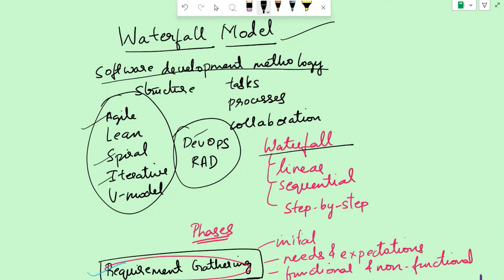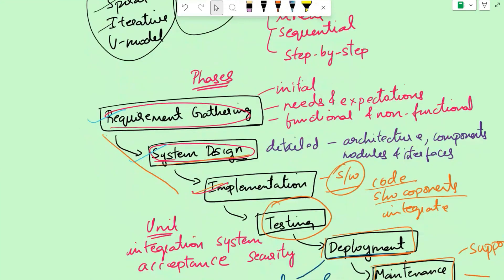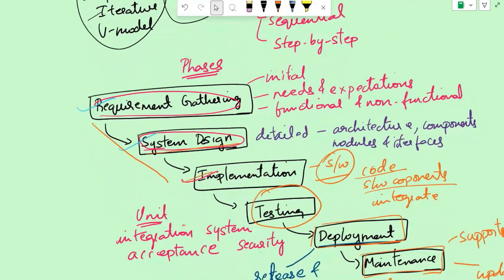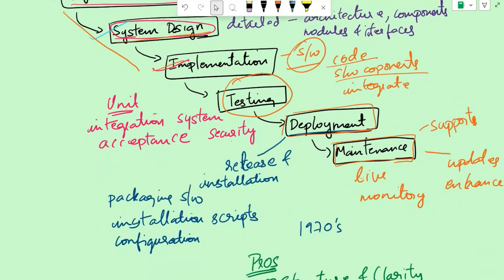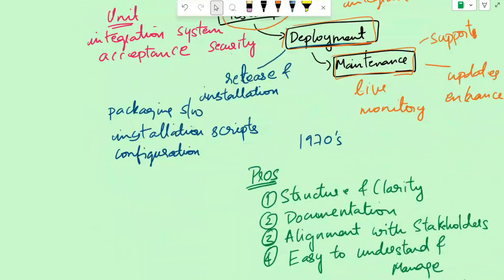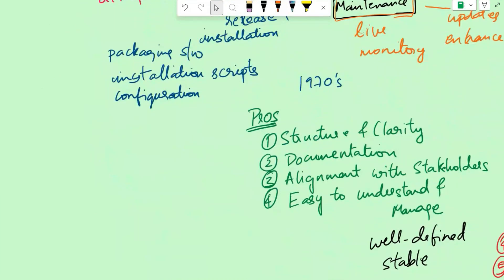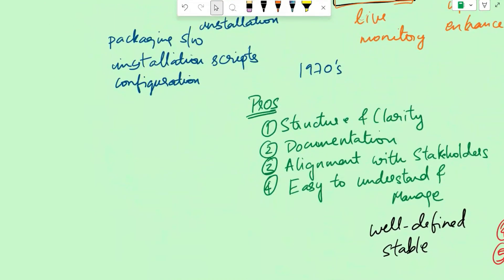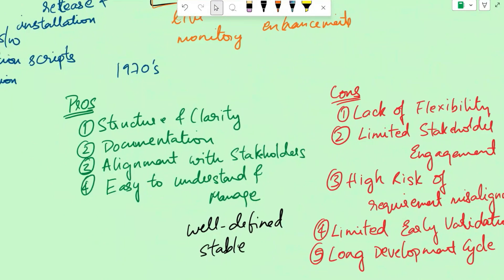So waterfall model, what is it? It's a linear sequential process model, which happens step by step. What are the typical phases of the waterfall model: requirement gathering, system design, implementation, testing, deployment and maintenance.